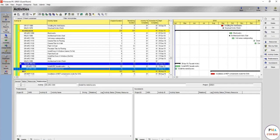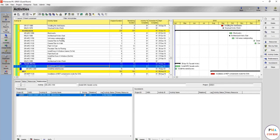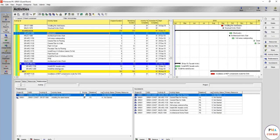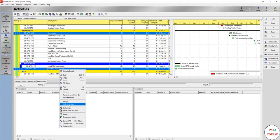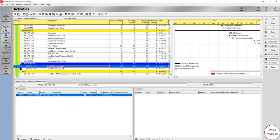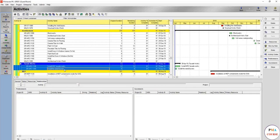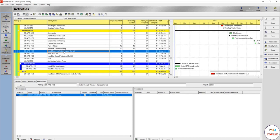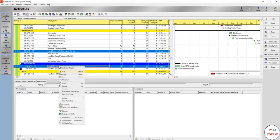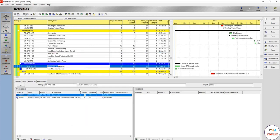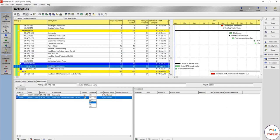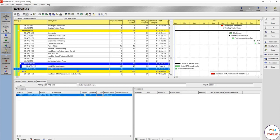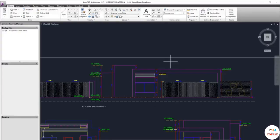The metal louvers would be the same case in practice. Does it relate to anything from the inside? Most probably no, or you can install the frames first for the windows especially and exterior doors and complete your GRC facade works. There are different ways. For the sake of this example, we'll link it together and make this finish to finish by three days. This one has nothing to do with the doors and frames as you see in the drawing here.